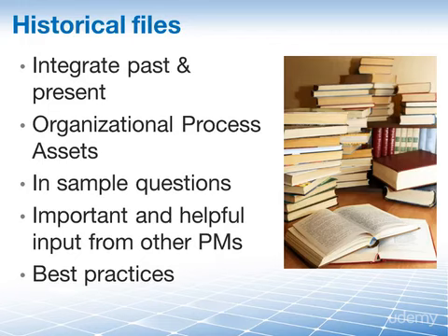Creating this historical information is an important output of the close project or phase process. As a matter of fact, it's the last one listed because it is one of the last things that you should do on the project. After all is said and done, you should document what has been said and what has been done.